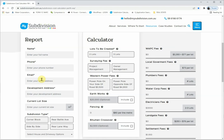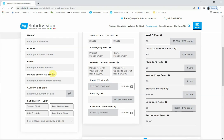Always keep a contingency plan in place if you're doing a subdivision — keep about $10,000 on top of what you're estimating to allow for any unforeseen circumstances. Going back to the report, we punch in the information. The lot size doesn't matter too much. The next one is subdivision type — you pick the option you're doing: corner block, rear lot, side by side, or rear laneway.